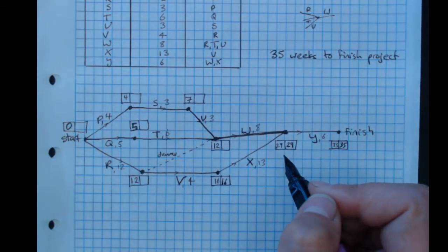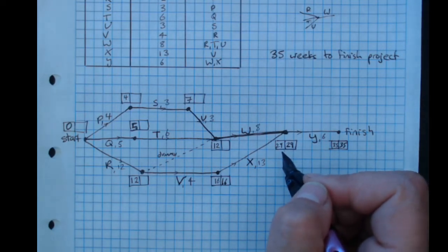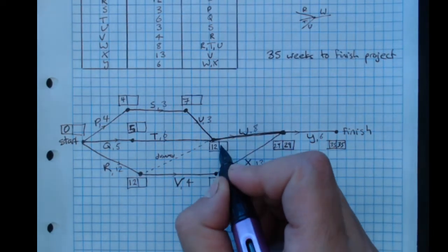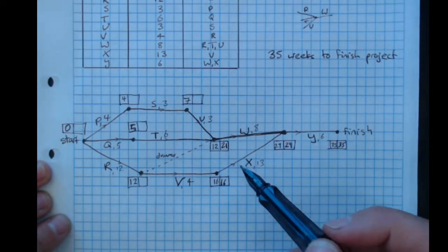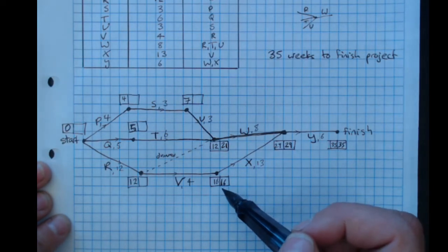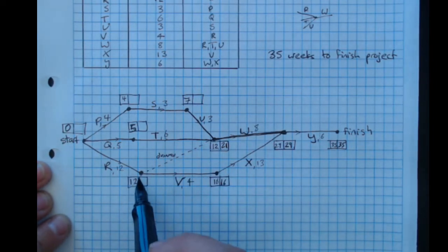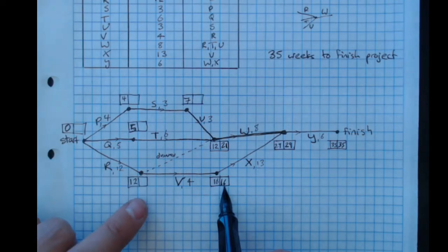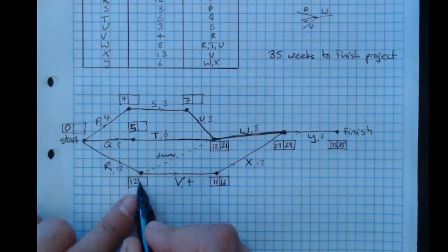Did I get something wrong somewhere? Well, it is 21. I've subtracted a wrong number in my draft somewhere. Keep going back. Now here I've got to see which one's the lowest. 16 minus 4 is 12. 21 minus 0 is 21, so I take the lowest one, which is 12.